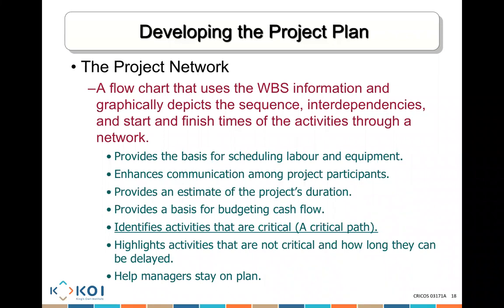It highlights activities that are not on a critical path. If something is not on a critical path, that means it is something that I am able to delay. So I need to know what I can actually delay, especially how long I can delay them for. Because sometimes you might not have enough resources. So if you delay one task, you'll be able to use your resources much more smoothly, as I'm going to show you a bit later. It helps managers stay on the plan. Once you have a plan, it is much easier for us to ensure we are sticking to it and delivering things according to the plan.